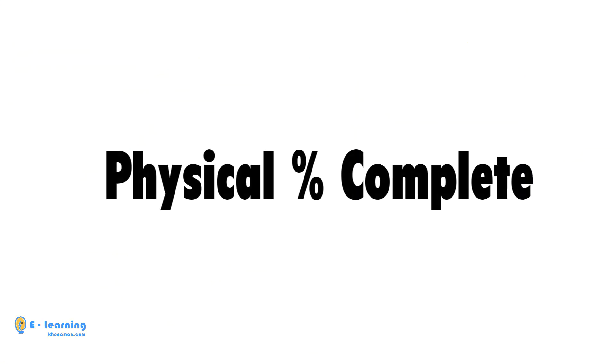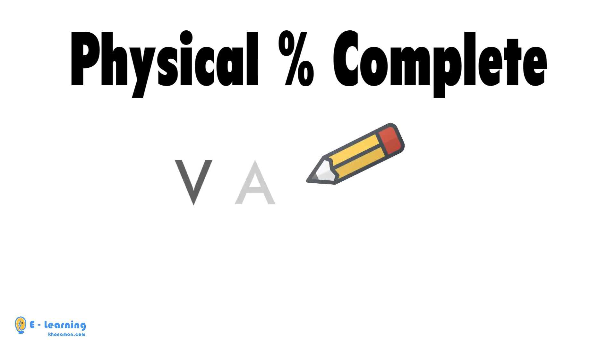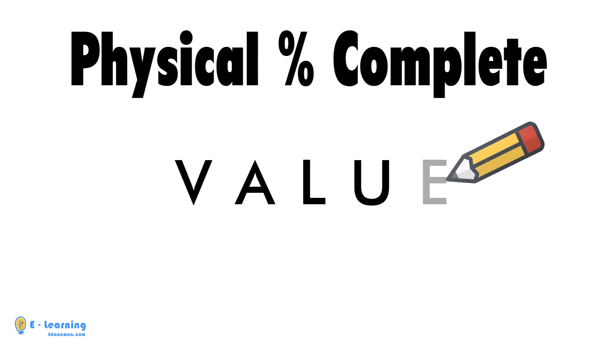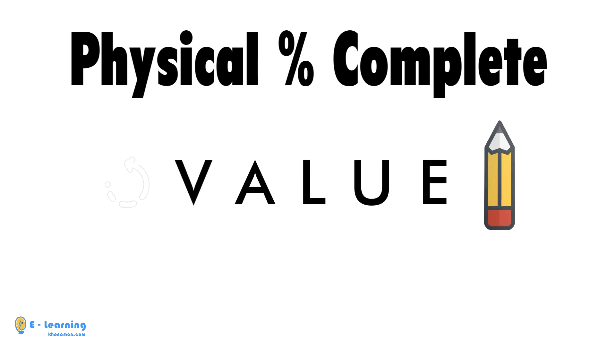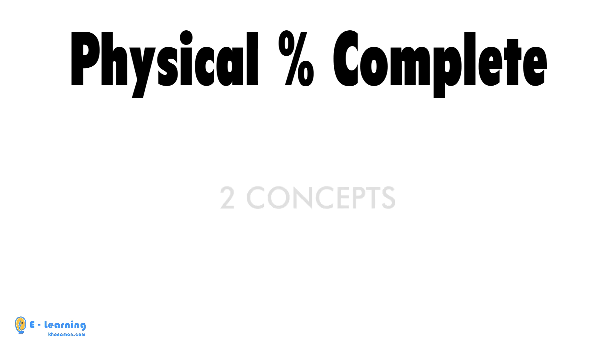Physical Percent Complete is a type that is entered manually. When you enter a value in the activity percent complete, you will update this type. This value is calculated by one of the following two concepts.